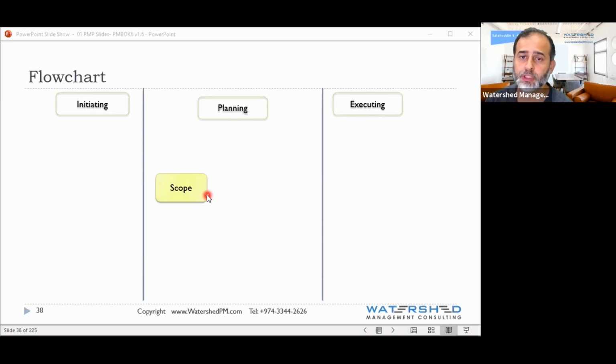Most common in agile is 1 week to 4 weeks. Actually, 2 weeks is almost like a common norm. Many projects have 2 weeks, some projects have 3 weeks, some have 4 weeks, and very few projects have 1 week. You know, 1 week is too tight, but in some critical projects they do 1 week. It's not easy, but they do it.